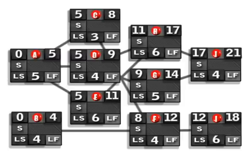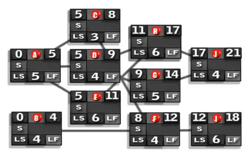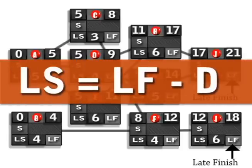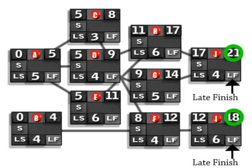That doesn't really give us a lot more information than what we had when we just identified all the paths and added up the durations. So what we want to do now is something called a backwards pass. When we begin our backwards pass, we're going to start with the late finish. To calculate late start, we take our late finish and subtract our duration. We have two ending activities. When you have two ending activities, you have to select between the two times. For activity J, which is an ending activity, it's twenty-one weeks, and for activity I, it is eighteen weeks. For both of these activities, we're going to use twenty-one to start our backwards pass, because twenty-one weeks equals the duration of the project. Everything has to be completed in twenty-one weeks.